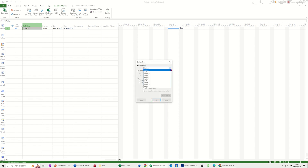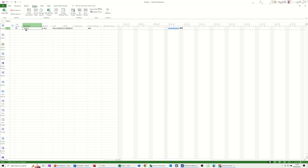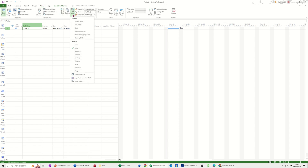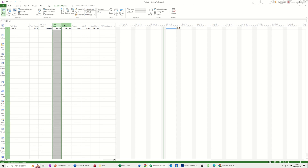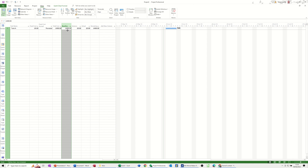You've got 11 baselines altogether. Select the first one and click OK. That has taken a snapshot of what your plan was. Now if you go to View, Tables, and have a look at the cost table, as soon as you save that baseline, that baseline column basically copied the cost column across like so.